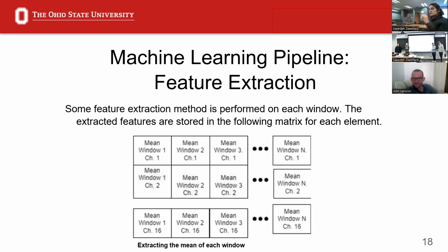When you're preparing your to-do list, whatever is left from this semester that you push to next semester has to show in your to-do list. That is a good way for me to know what I should get updated about in the first 2 weeks of classes. Put the name of the person responsible for solving that problem and bringing the progress to 100%, and then your timeline. Even though you have it on your Gantt chart, I want it extracted.